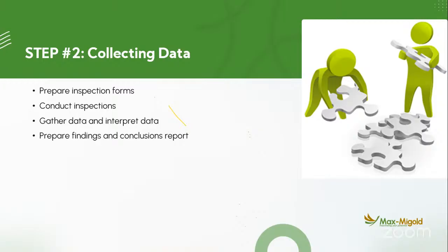With their quotation, you assign cost to each of those things that need repair and those ones that need replacement. After assigning the cost, you do the total sum of the cost. That tells you the amount you are going to use to get the facility back into operation.